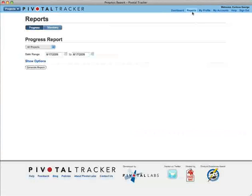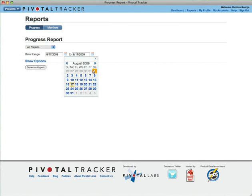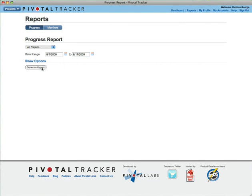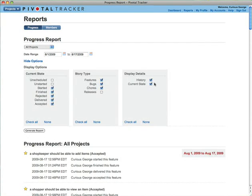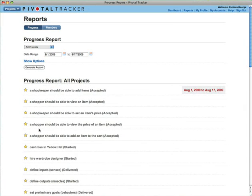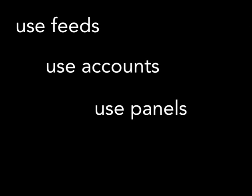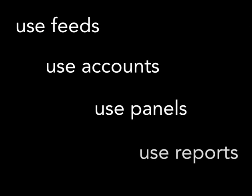The progress report shows the time that elapsed between each event in a story's lifecycle in a printable format. Customize it to see how long different processes are taking. Now you have plenty of tools for viewing and managing projects. Let's see what all we can do with stories.